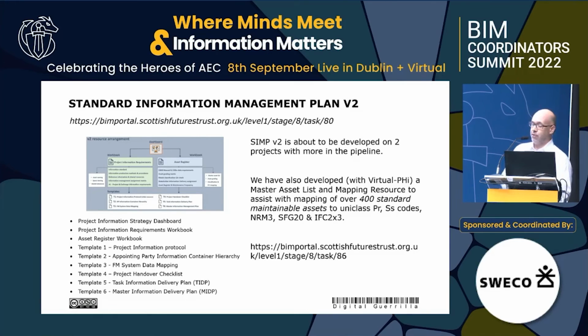And as Ryan pointed out, us and Virtualify used mapping. So we've got 411 assets that have been fully mapped to PR codes, SS codes, NRM, HT20, NRM3, IFC enumerations as well. So it's all in there to help design teams export as much open standards, fully mapped data as possible. But again, it's open source, it's out there for industry to look at, so it'd be good to get some feedback on how we're progressing on that as well.